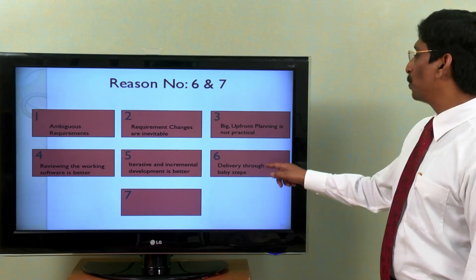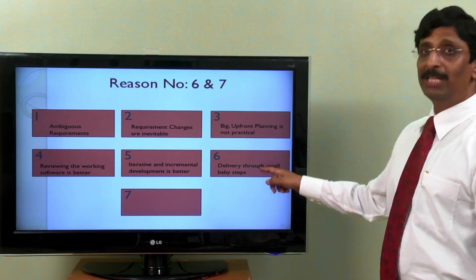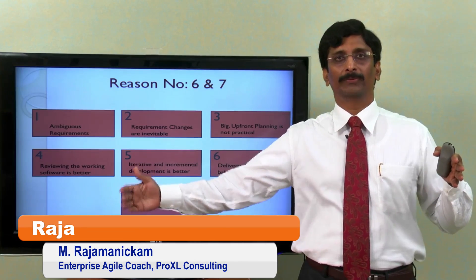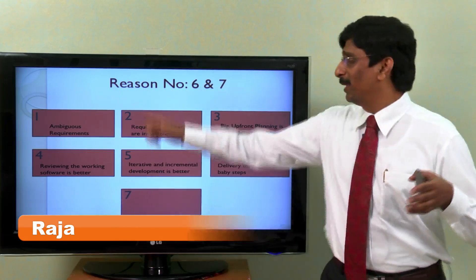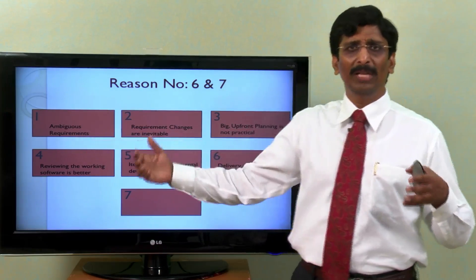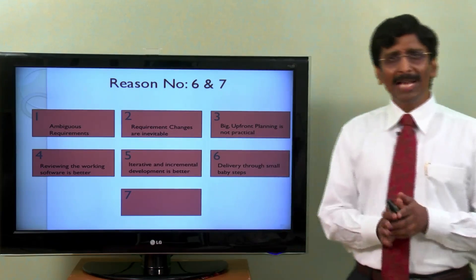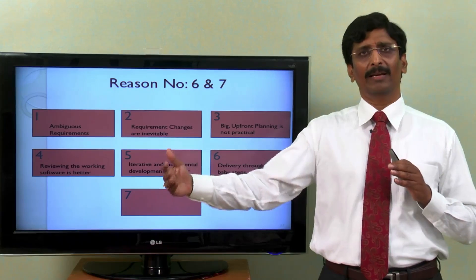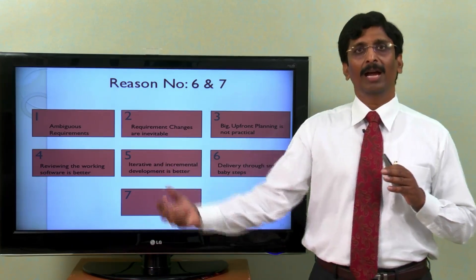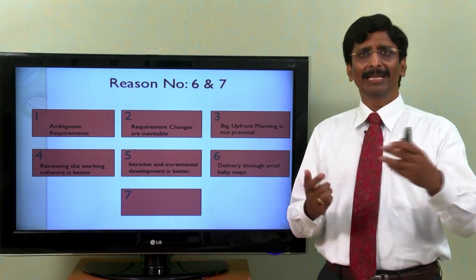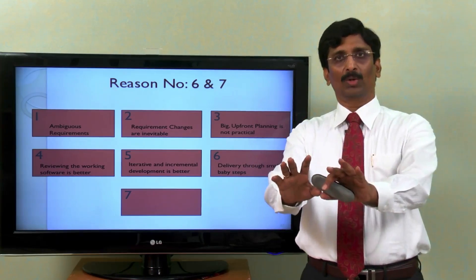Delivery through small baby steps is always better than a huge delivery by the end of the development life cycle. Especially because when the requirements are ambiguous and the customers do not know everything that they want, if you ask them, tell me what are the top five or six requirements that you really want and develop that, do requirements, do a design, code it, test it, show your working software to the client.